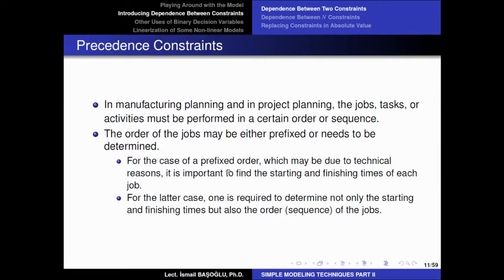Imagine you have a prefixed order, possibly due to a technical reason, and we are trying to define the starting and finishing times for each job. For the other case, we need to determine both the starting and finishing times of the tasks and also the sequence of jobs. For example, in the first type, you may say there are two tasks A and B, and A should be completed before B is started — A precedes B — so before finishing A you can never start B.